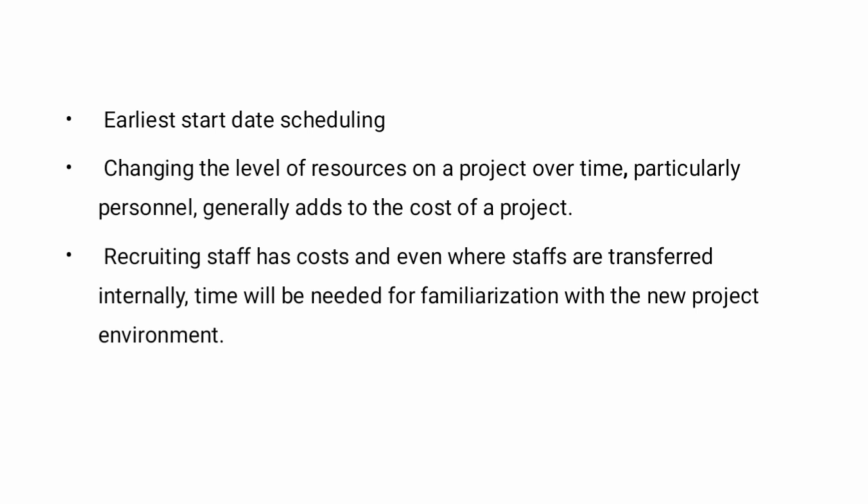Changing the level of resource on a project over time, particularly personnel, generally adds to the cost of projects. Recruiting staff has cost, and even where staff are transferred internally, time will be needed for familiarization within the new project environment.